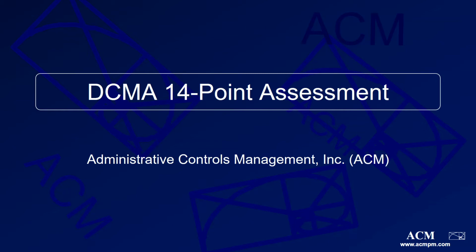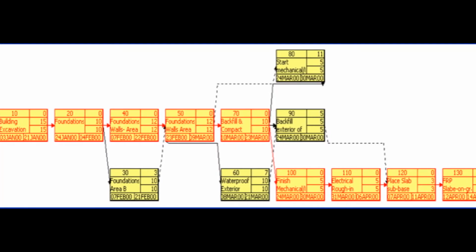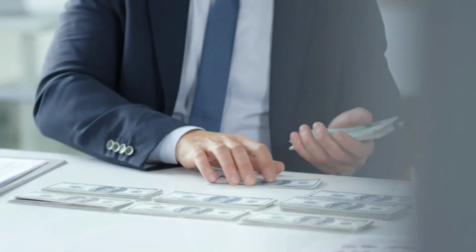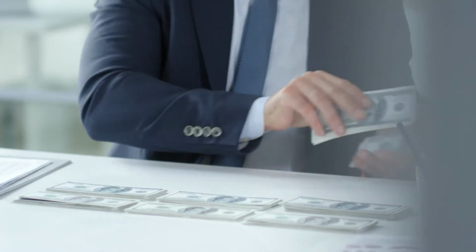Hello, in this video we'll be discussing the Defense Contract Management Agency 14-point assessment. The DCMA 14-point assessment includes 14 different checks that are run against the CPM schedule to ensure its quality and increase the likelihood of a successful project.